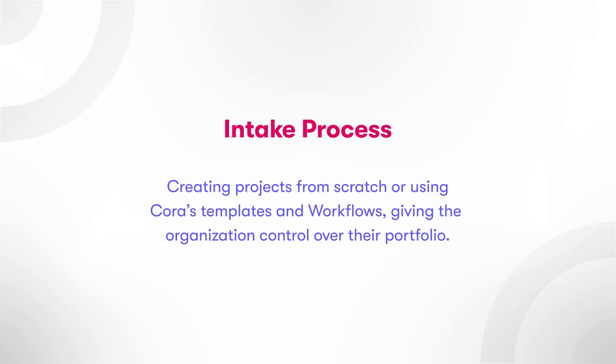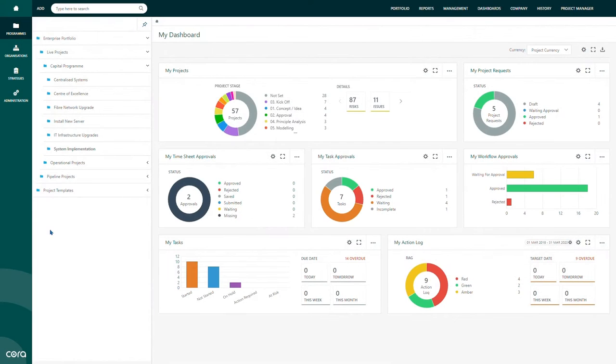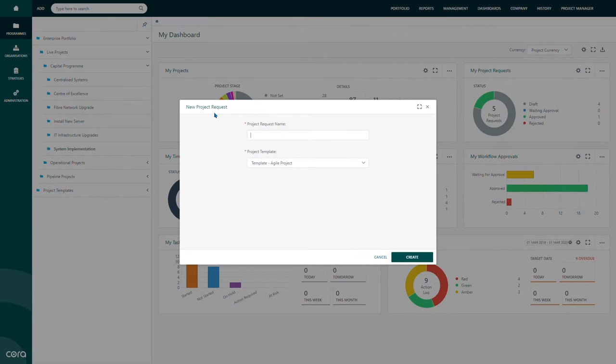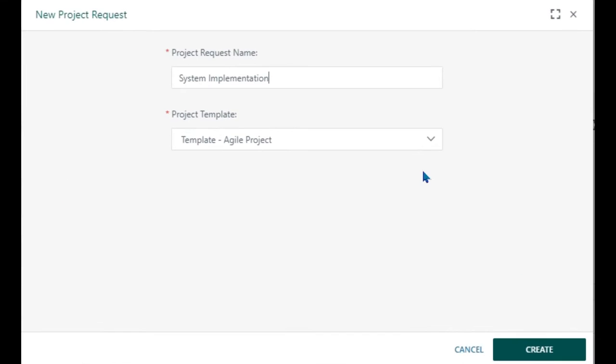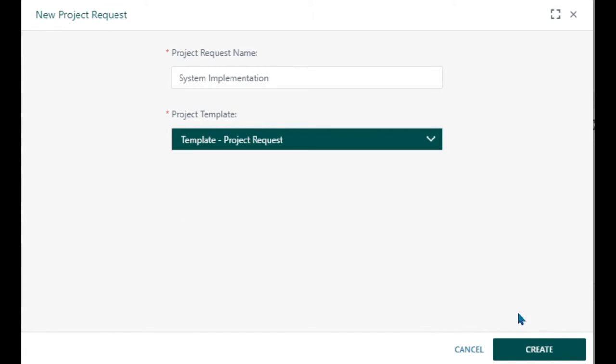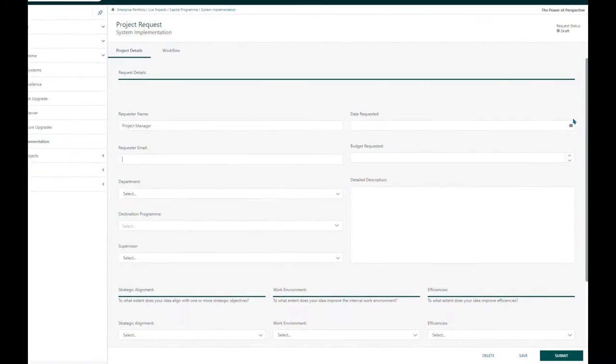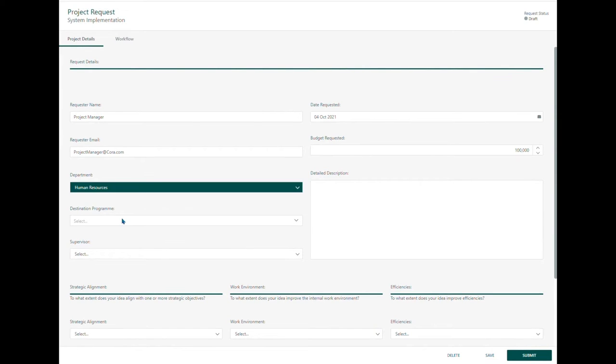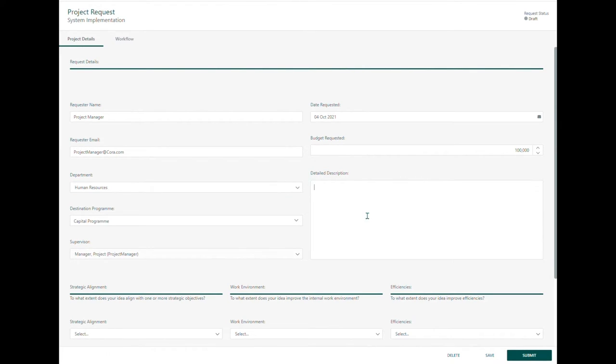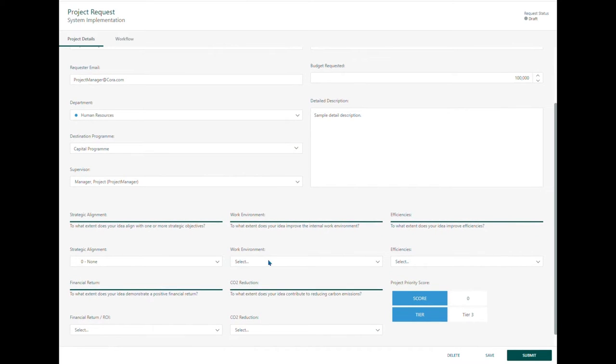Intake process. Projects can be created in multiple ways. You can create blank projects, or using Cora's templates and workflows, you can create projects with predefined parameters, such as the methodology, scheduling, or the risks and lessons learned, to name just a few.